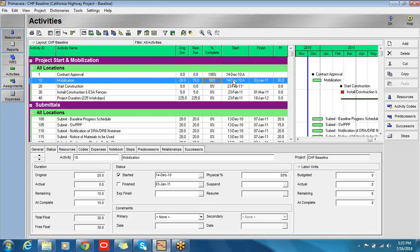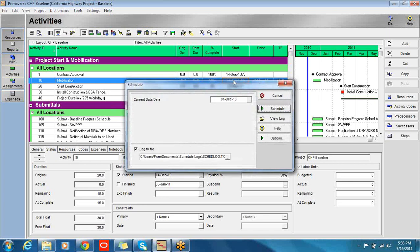So it's a great process — that's pretty much all you have to watch out for. Test it a few times to make sure you understand that it's working correctly. I think you'll find it very convenient, especially when you're collecting data for the update from other parties. Technically, I need to advance the data date and reschedule the project, but otherwise you can see this is a very fast way of inputting progress.